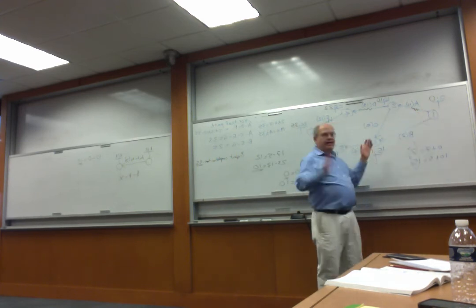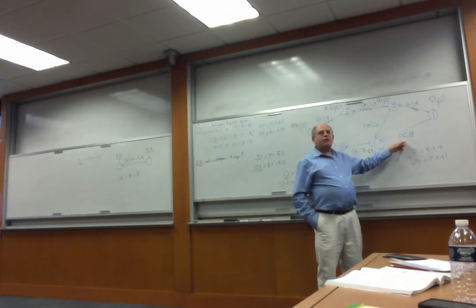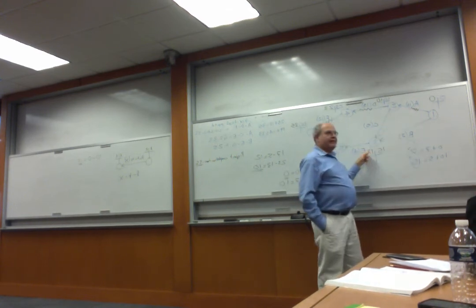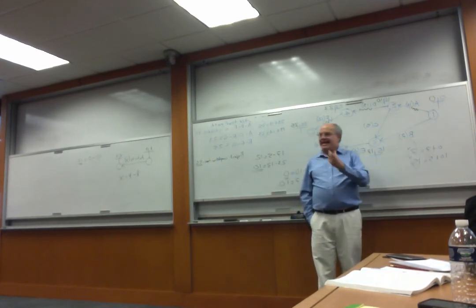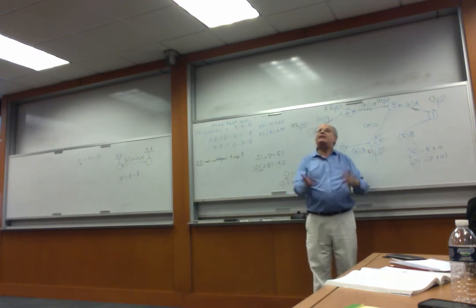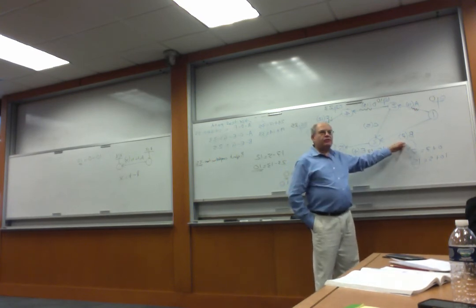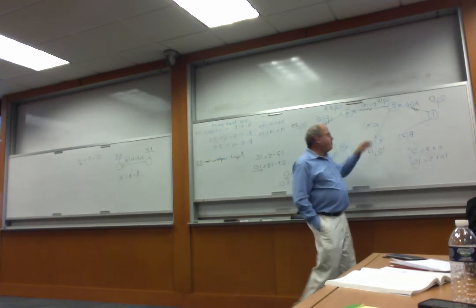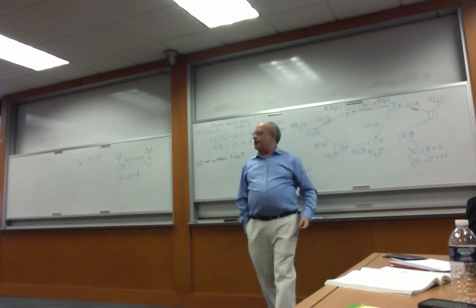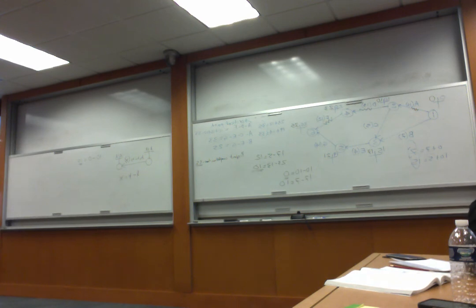From 0 to 17, we have a time window of 17 units. But B takes only 7. So there is a cushion of 10. Why 10? The difference: 17 minus 7 is 10. That cushion means you can raise the length of B from 7 to 17, slow it down if you want. If you replace that 7 with 17 and keep everything else the same, that 35 is going to still be the same. But if you were to start at 11, then you violate the cushion by 1 unit, and it's going to be late by 1 unit. That's very good to understand.